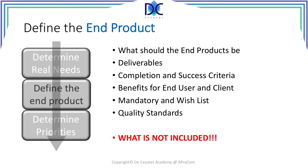The next step is about defining the end product. What should the end product or products be? What are the deliverables that have to be provided? When is the work completed? It's very important to say when we reach this goal, the work is completed. What are the success criteria? How do we define success? What are the parameters? In this step, we have to identify the benefits for the end user and the client. The end user may end up with a more efficient program working better, and the client may save a lot of money.